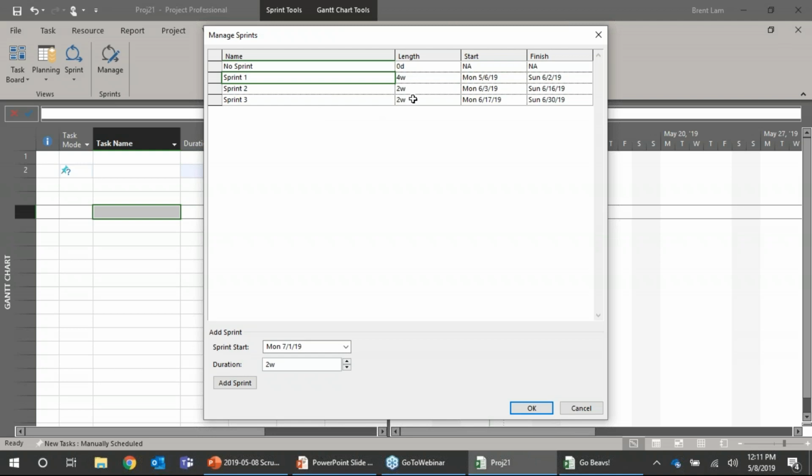Tip number 1 that I have, that I've experienced in my time, is that if you have a brand new Agile team or your team is working on a whole new product or something you've never worked on before, I personally really like 4-week sprints. I know 2 weeks is the norm, but especially for a new team, that 2 weeks can be very, very fast. You have to do your sprint planning, your development, your testing, your deployment, your retrospective, and then your next sprint planning all in that time.